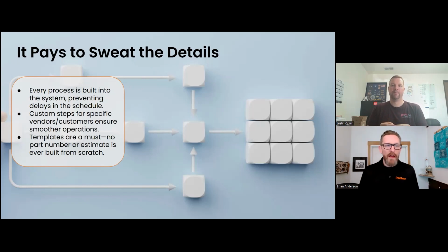And the point you made about putting the check in the right spot, that is so crucial because even after we fixed this problem the first time, where okay, now we put the check material cert operation up when we received the material, we actually found that we were still having a secondary issue where the work order was configured properly, but our receiving individual, when they received the material, was going to the vendor PO and receiving the material and checking it off and doing everything that we asked them to do.